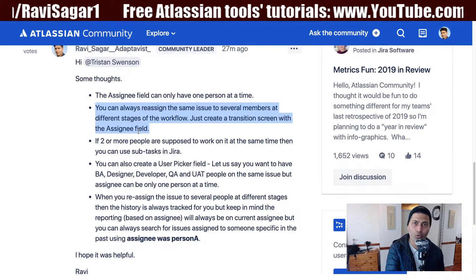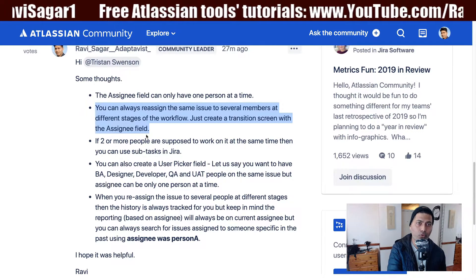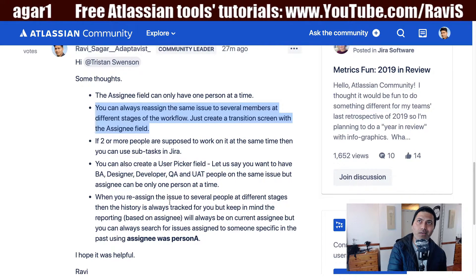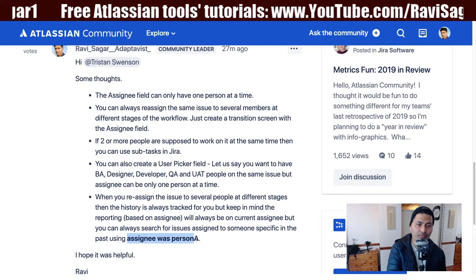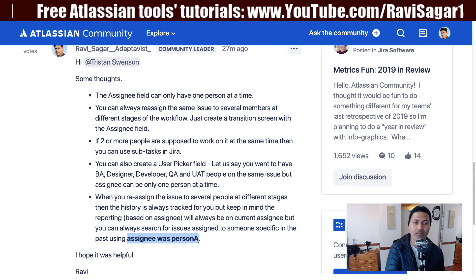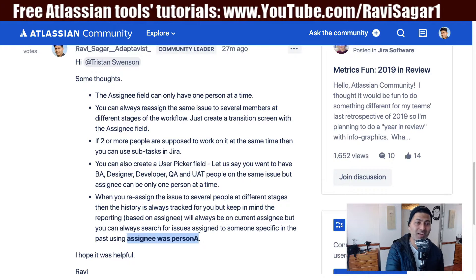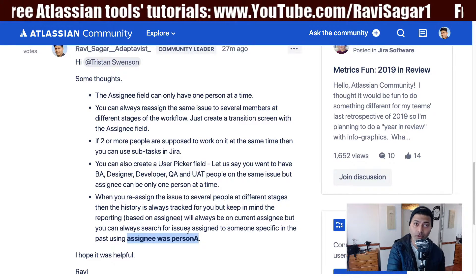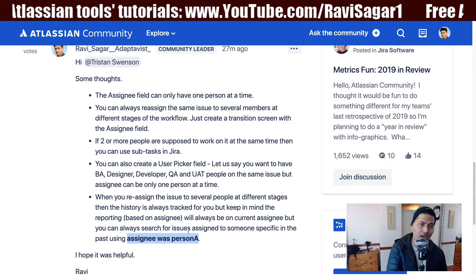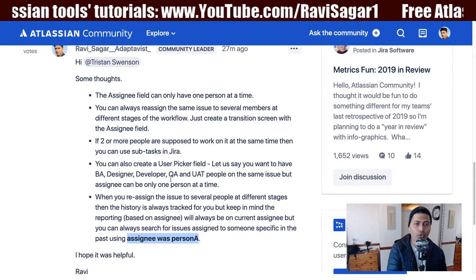With this approach you can keep reassigning the issue to multiple people, and you won't lose track of who did what because Jira maintains history. You can use a JQL query like 'assignee was' — for example, 'assignee was Person A' or 'assignee was Person B' — to find all issues a person worked on, which is useful for reporting purposes.